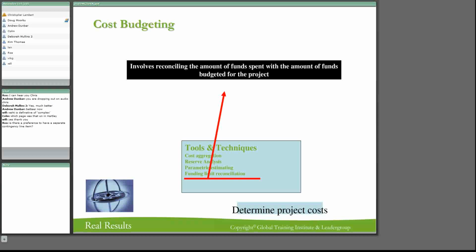In other words, your labor costs are going to be reduced, because there should be a learning curve, and you should be able to reduce those costs. That's where most of your savings in parametric come from, your labor costs. The other area you're going to save in is your material costs, by buying in bulk.